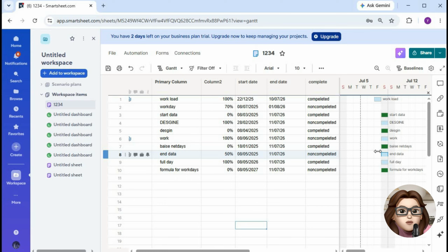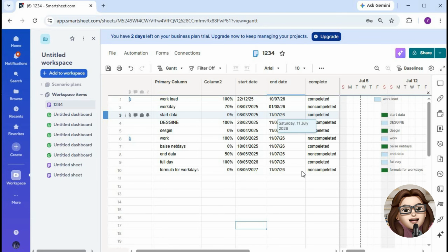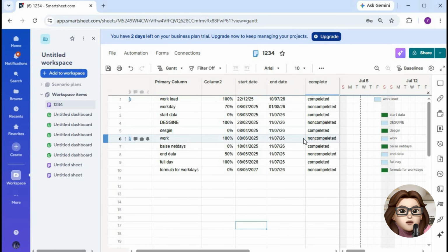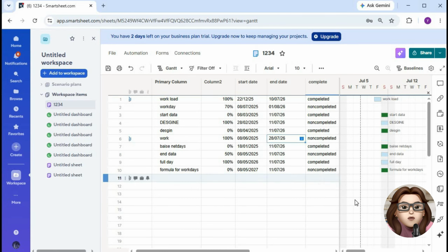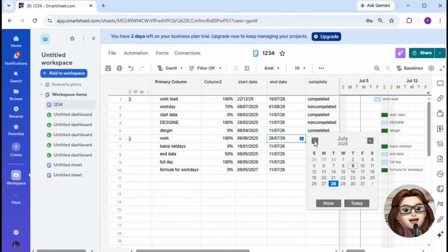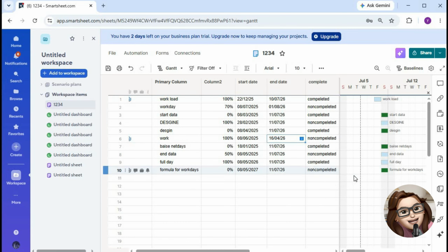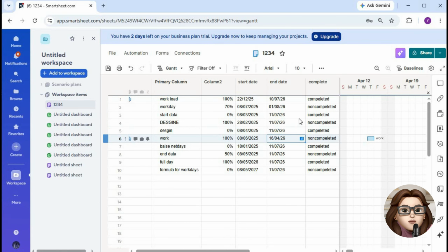You can adjust task dates directly from the Gantt chart by dragging the bars left or right. If you need a task to last longer or shorter, simply drag the edge of the bar to update its duration. For more advanced project planning, enable dependencies in project settings. This allows you to connect tasks, create predecessor relationships, and automatically update schedules when changes occur.